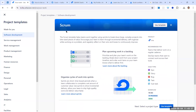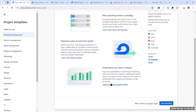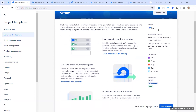The Scrum template lets you plan upcoming work in a backlog, cycle into sprints, and understand the team's velocity. By creating a scrum project you can manage your backlog, work in sprints, and use agile metrics. The default issue types are epic, story, bug, task, and subtask, with a simple workflow of To Do, In Progress, and Done.